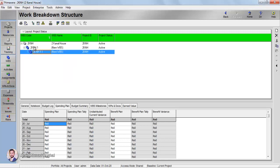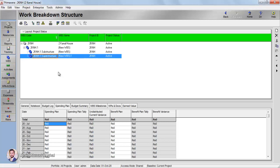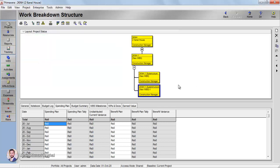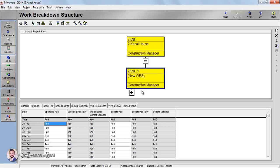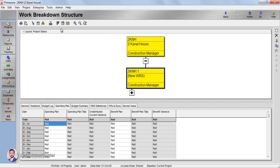Clicking Add creates a new WBS element underneath Two Canal House. I'll write 'Substructure' here, then add another and write 'Superstructure.' I want Superstructure to be at the same level as Substructure, not underneath it, so I'll indent it to the left — or outdent it. In the chart view, you can see Two Canal House with Substructure and Superstructure both at the same level.